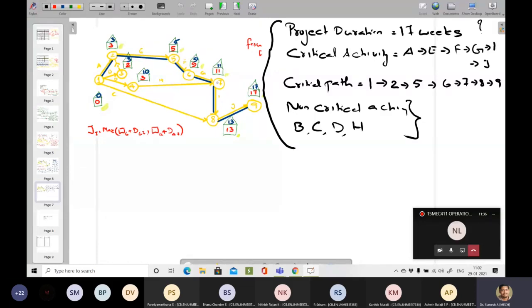And I told you critical is the one in which the project duration lies, and for the non-critical you will have the freedom to start an activity late and finish it on time, or start it early and finish it early, without affecting the successor nor the predecessor. You will have the option to plan it.